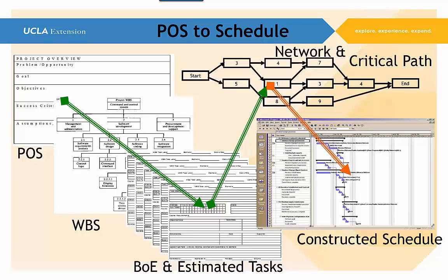Once we have all that information, we can then take all this basic information and develop our cost estimate. And all during this entire period of time, we're collecting elements that are potential risks, and then we can do our risk management plan and our risk registers, and start identifying and looking at risks, set up the probability and scope out the impact, and then decide how we want to handle the risks, how we are going to stack them up, how we are going to process them, and what mitigation we're going to use. Then we can go forward and we have our project plan, and we can take it forward for approval and authorization to actually establish it as the approved baseline for our project. So this gives us a real good sense and flow of what we are doing as we process through the planning cycle for a project.